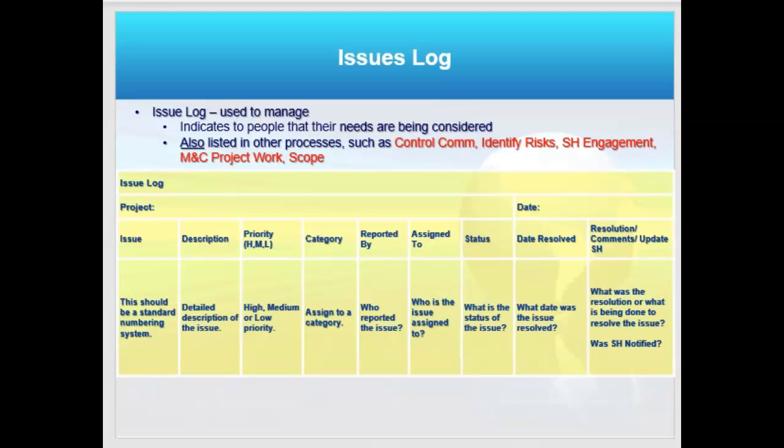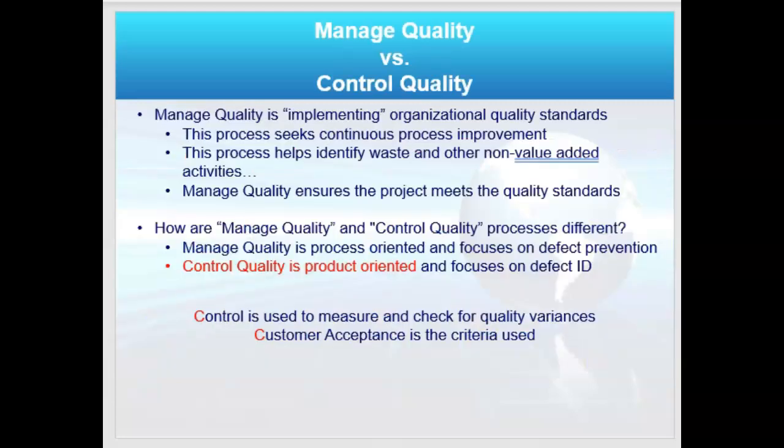Also, an important part of being a project manager, and especially here, is the issues log, right? It's used to manage. I never walk around without having the issues log in my hand, okay? And if I hear of an issue, even at the water cooler, just talking to somebody, I'm going to write it down, track it down, assign an owner to it, and then follow up with that person later. One, they know they're heard and they were listened to. Two, they're impressed at the feedback. And three, I now have a forever partner in my project, an advocate.